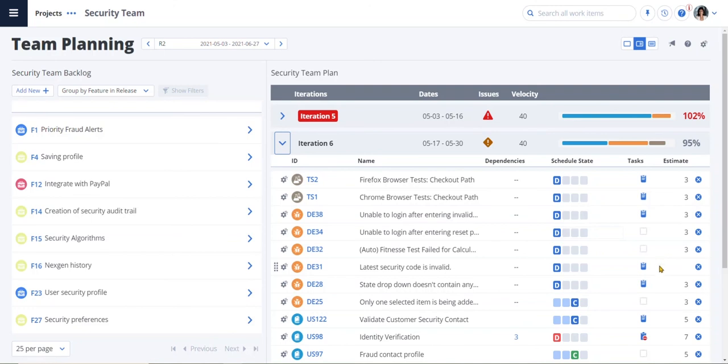I can drill down and see things like we're missing estimates for some of our tasks. The team can ensure the top stories for the highest value features are done first and create an optimal plan that everyone can agree to. This helps tee up the confidence vote for their plan.